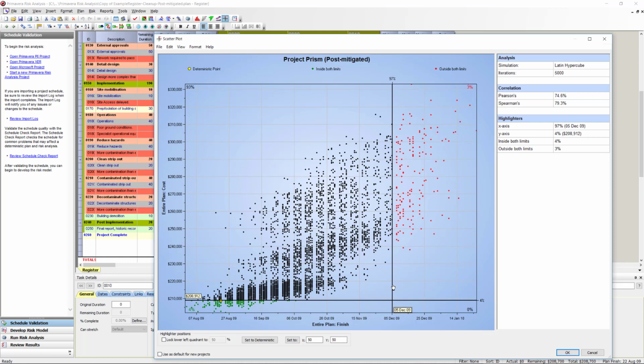So if I want that 90% level of confidence, here is what I'm doing. Look, I'm going there, 90%. Here it is. Okay. So if I want 90% of confidence, then we have to tell the customer that the project will be done by November 17.